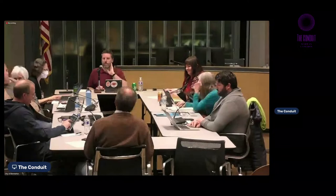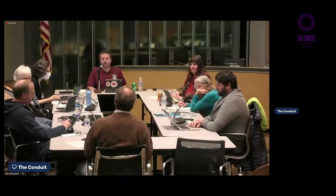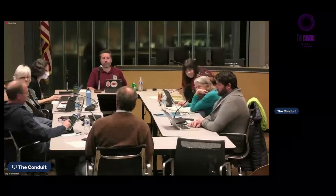Okay, that makes sense. I just saw the language about it being the lowest bidder, it was most experienced. So just checking on the low bid. Okay, so basically the two bids didn't meet specs by our qualifications. There's no issue with lowest bidder here, right? Yeah, correct. Per the RCW, we cannot select a consultant based on bid. We have to select them based on qualifications. If we do have problems in negotiations with price, we can then go ahead and move to the second, but if we start off with the first, then we didn't have that much of a problem with negotiations. Okay, excellent. No, thanks for explaining that.